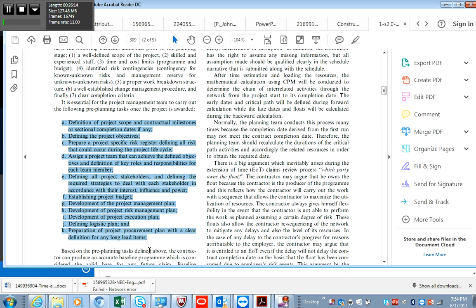and then you obviously have to go through this process, which is you prepare all these bits here, then you go to establish project budget. All of this stuff is just preliminaries. Yeah, so what you want to be looking at is this part here, the development of the project execution plan and the project risk management plan. In this particular bit, it should have been highlighted in the project risk management plan. If it wasn't highlighted, the moment it becomes apparent, or the likelihood of occurrence increases to 100%, i.e. the risk has happened, you have to include it in the risk register.